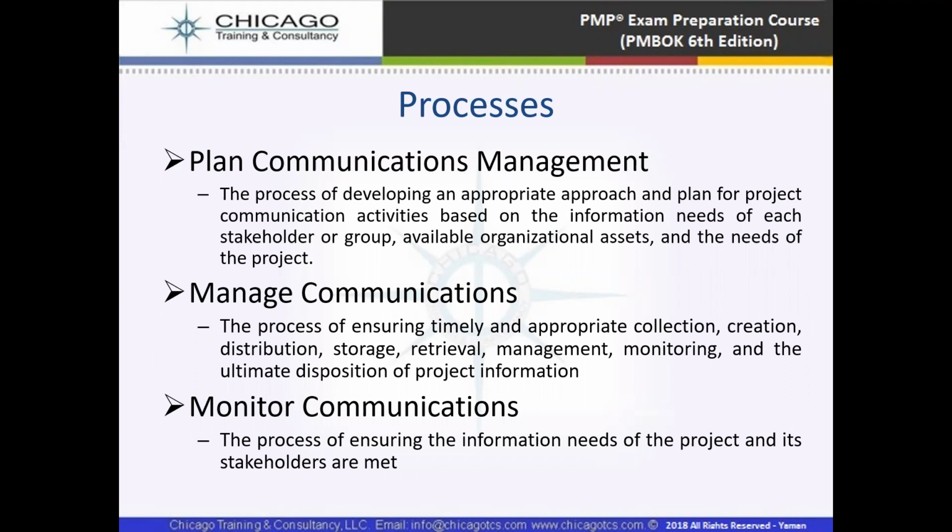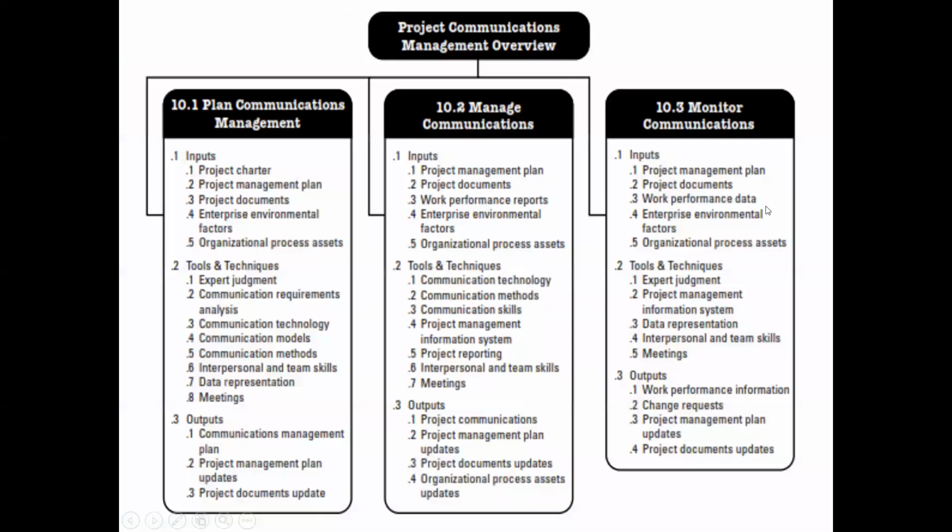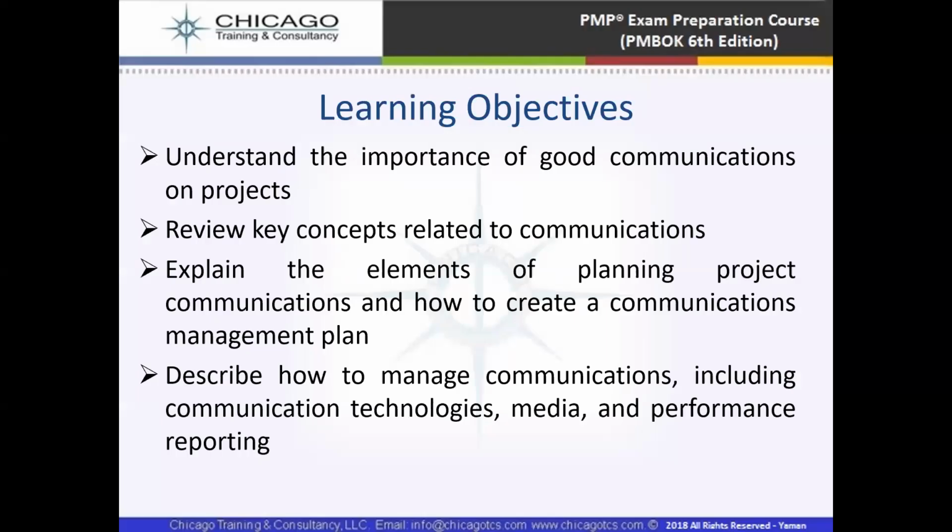We are writing our communications here, based on any progress meeting. We minute the kickoff meeting, the weekly minutes of meeting, the monthly minutes of meeting. We are writing them, we are monitoring them. So that comes under monitoring communications. This is just an overview of the 3 processes in the communication management knowledge area.